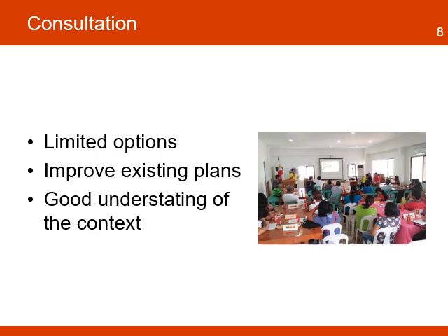Consultation refers to a minimal level of participation in the planning process. In this situation, there may be limited options to develop the plans, or the project has already developed implementation plans and seeks to improve them with the feedback from key stakeholders. This is a situation where the project does not have much time or resources for a deeper level of participation, or there is a good understanding of the context of the project. The feedback provided by the participant is then incorporated into the plans.